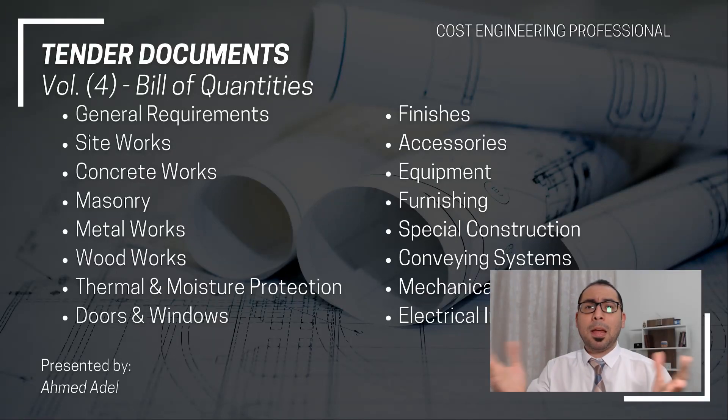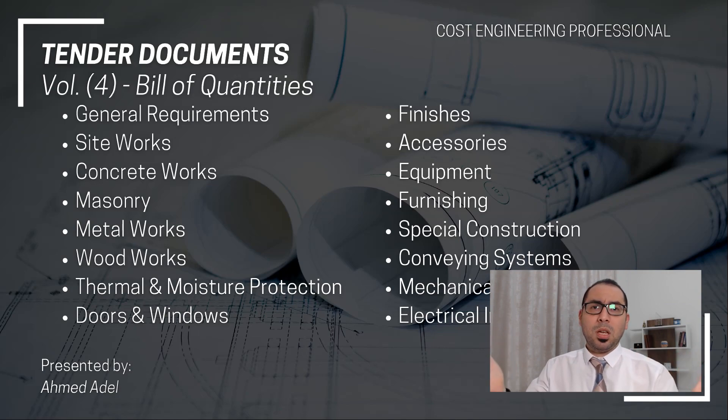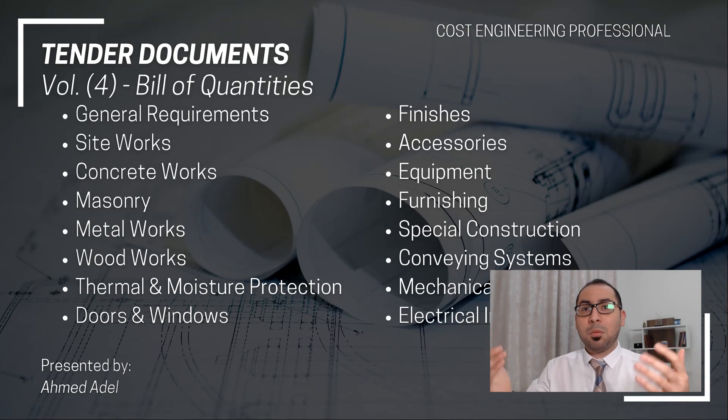Volume four is the bill of quantities. The BOQ includes several sections: general requirements, site works, concrete works, masonry, metal works, wood works, thermal and moisture protection, doors and windows, finishes, accessories, equipment, special construction, conveying systems, and mechanical and electrical installations. Inside each section you will find items measured from the project drawings (volume three), with descriptions referencing the specifications (volume two) and any relevant conditions of contract. The BOQ is where you price the project and is a major part of your tender submission.